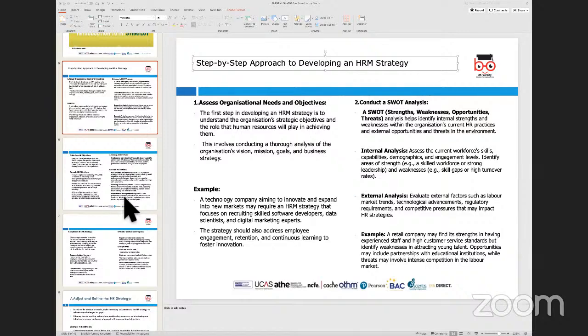Now, that in general tends to be how you create a plan. So you start with introspection, do analysis on the current situation, then you go into firming up clear objectives and define a plan that would consist of a number of activities. At some stage, you would look at implementation of the plan. You'll define the steps for implementation. After the implementation starts, you start monitoring and evaluating the plan. If there are things not going right or if things need to be adjusted or refined, you would look at adjustment and refinement to that plan.